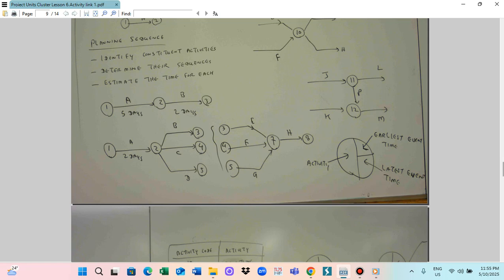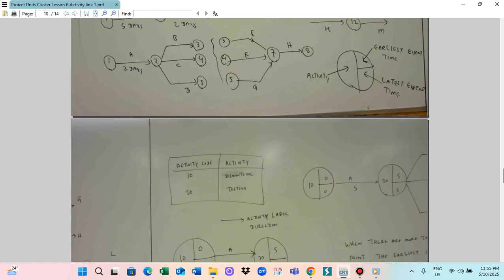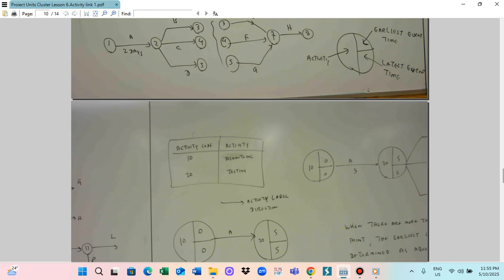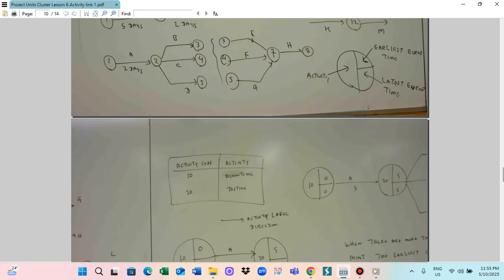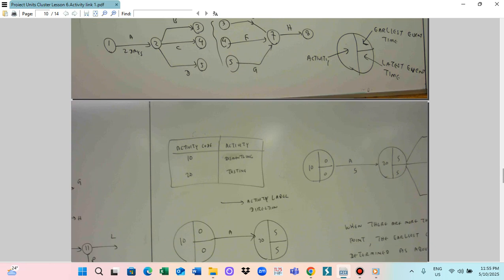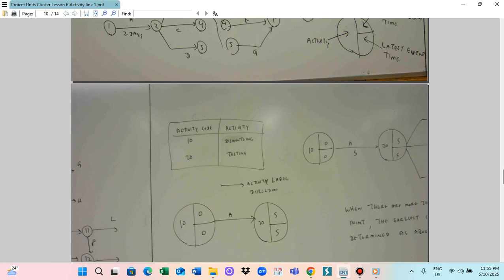Another one we use is the critical path analysis. For each node you have to indicate the event, the earliest event time, and the latest event time. Those three things you have to record. Every node is a step to complete the project. For example, you are designing a system. First, you test all the equipment. This is one node. And then you dismantle the equipment. This is the second node. And you reassemble it. This is the third node. So there are 3 days.